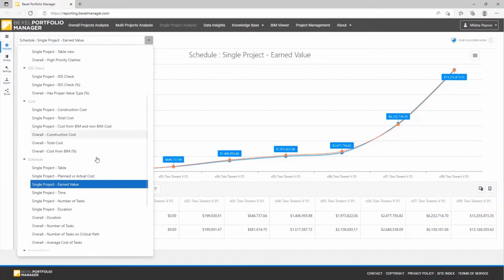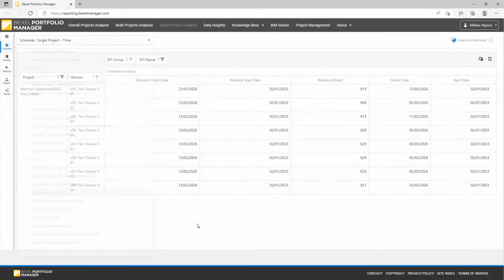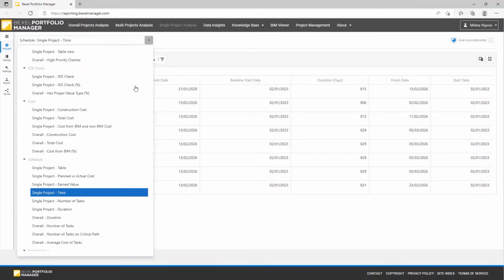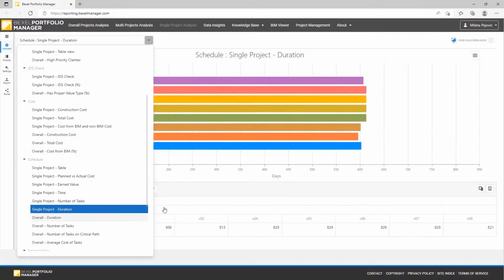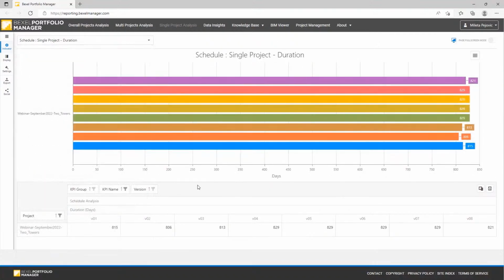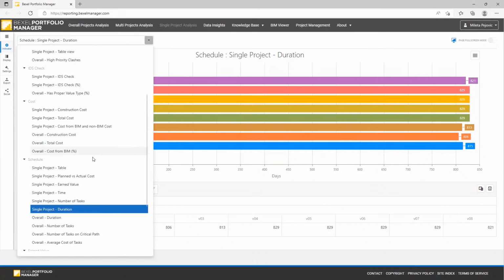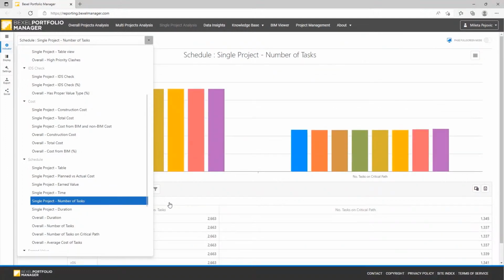Another available sheet is a timetable with baseline and actual schedule duration, start and end dates, so we can analyze how duration is being changed after each progress entry. The same thing can be seen as a graph with differently colored duration for each project and schedule revision. If needed, we can also track if the schedule itself was changed in case we added or removed some activities.